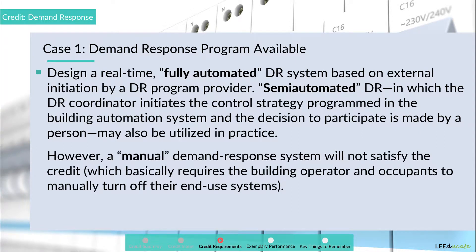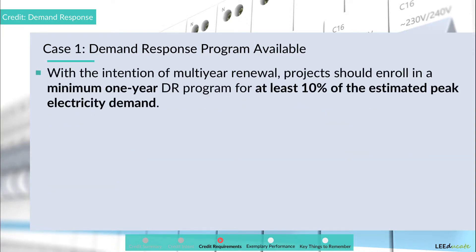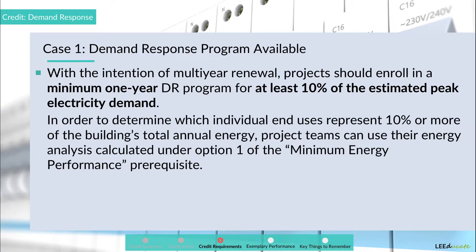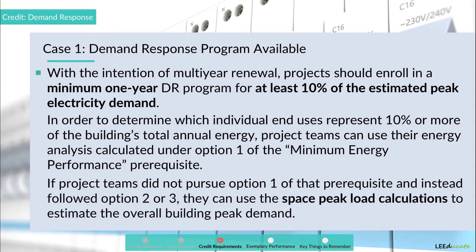However, a manual demand response system will not satisfy the credit, which basically requires the building operator and occupants to manually turn off their end-use systems. Activity 2: with the intention of multi-year renewal, projects should enroll in a minimum one-year DR program for at least 10% of the estimated peak electricity demand. In order to determine which individual end-uses represent 10% or more of the building's total annual energy, project teams can use their energy analysis calculated under Option 1 of the minimum energy performance prerequisite. If project teams did not pursue Option 1 and instead followed Option 2 or 3, they can use the space peak load calculations to estimate the overall building peak demand. This is also important to know for exam purposes.